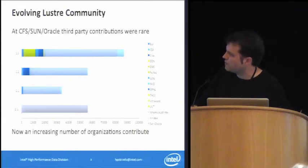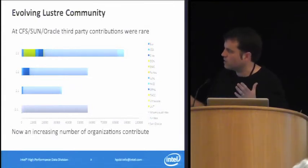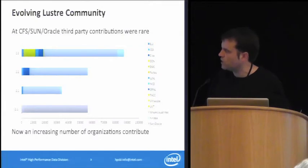While it's not quite the same amount, it is fairly significant amounts of effort that went into producing that release. And so I paused and reflected, why is that? In terms of scope, we did increase the scope slightly because we added Red Hat 6 support. Red Hat 6 had come out during the time it took us to get organized, so originally it was out of scope for the Oracle release. We added it in, but really that wasn't the most significant factor.